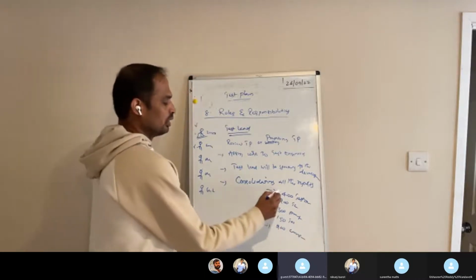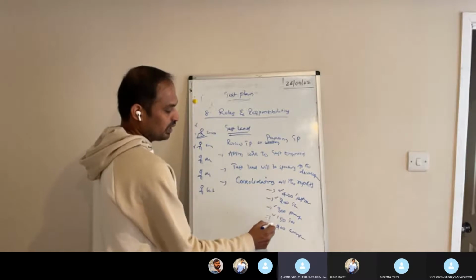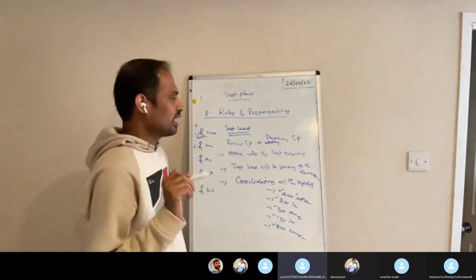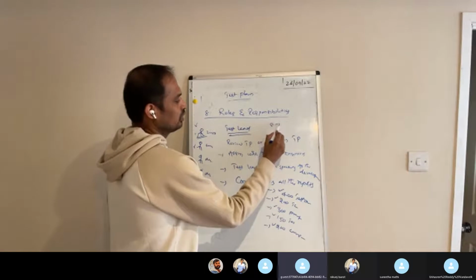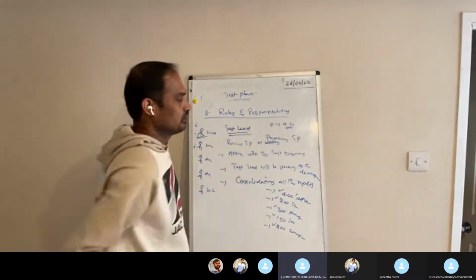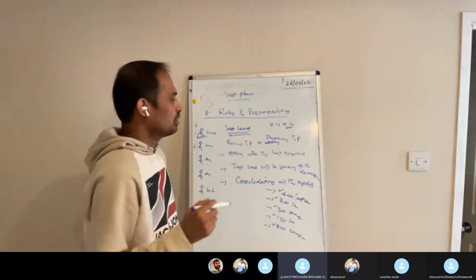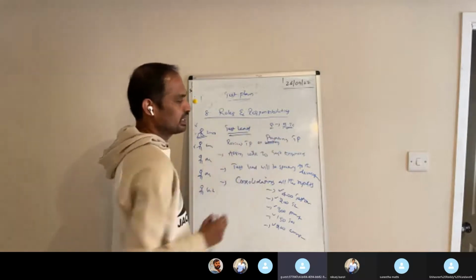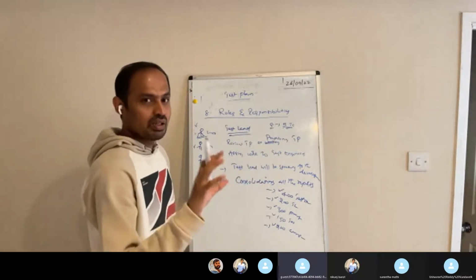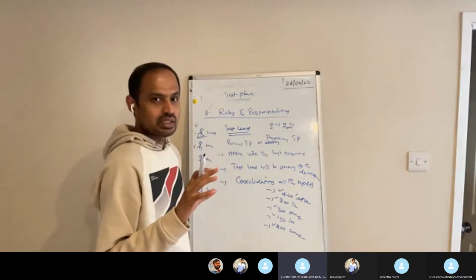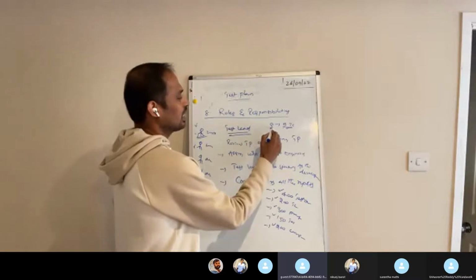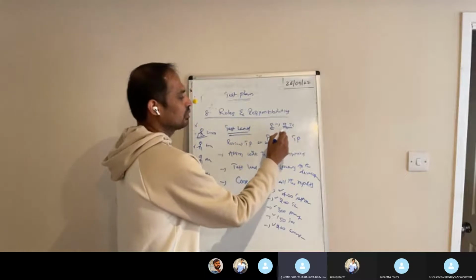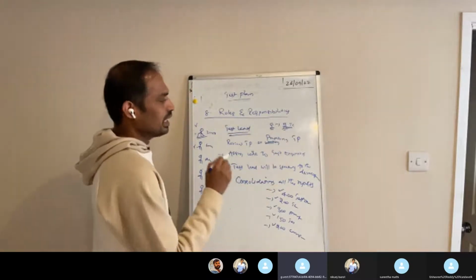These 400, 200, 300, 150, 200 test cases, we are not able to finish in a single day, right? Manually we can test a maximum of 8 to 15 test cases in a day, depending on how big they are. This is an assumption based on the difficulty level of the test cases. If it is a big test case, we test only 8 in a day; if we have smaller test cases, we can go up to 15.